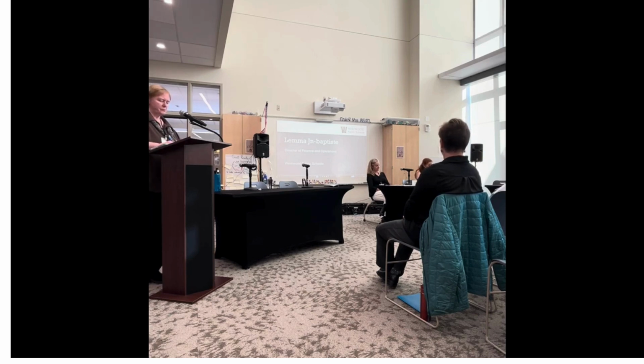So I'll speak more about the IRA program and our claim size in a few minutes, but I would say that again, the takeaway for us was the expertise of the people who were on the team, the SBC in particular at this early phase, and the fact that they didn't prematurely commit to capping the budget, and a willingness to value engineer some things out of the project in order to pay for that incremental $3.5 million that we had to face to incorporate a geothermal system. And there were some things that were given up here, as beautiful as it is as a building, but we didn't get everything we wanted.